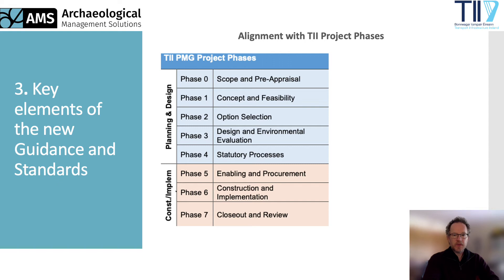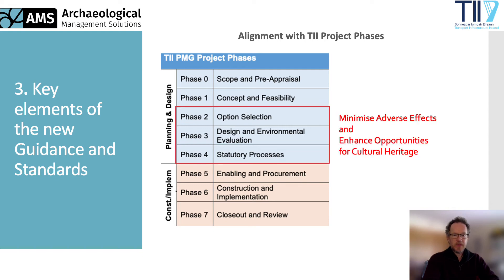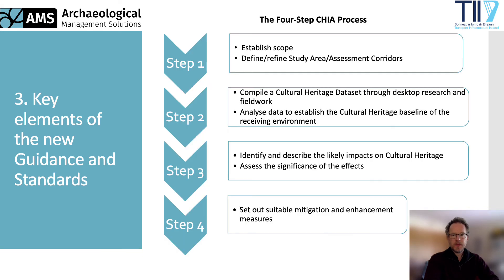The new guidelines and standards are structured around the phases and stages set out in TII's Project Management Guidelines, or PMG. Cultural heritage impact assessment is a process that extends across PMG phases 2 to 4, and within each phase the cultural heritage input seeks to minimise adverse effects and enhance opportunities for cultural heritage wherever possible, using a four-step process for each iteration of planning and design. Step 1: establish scope and define or refine the study area or assessment corridors depending on the project phase. Step 2: compile a cultural heritage data set and analyse data gathered through desktop research and fieldwork to establish the cultural heritage baseline. Step 3: identify and describe the likely impacts on cultural heritage and assess the significance of effects. Step 4: set out suitable mitigation or enhancement measures to be considered during option selection and design, including measures to be implemented during construction and operation of the project post-consent.